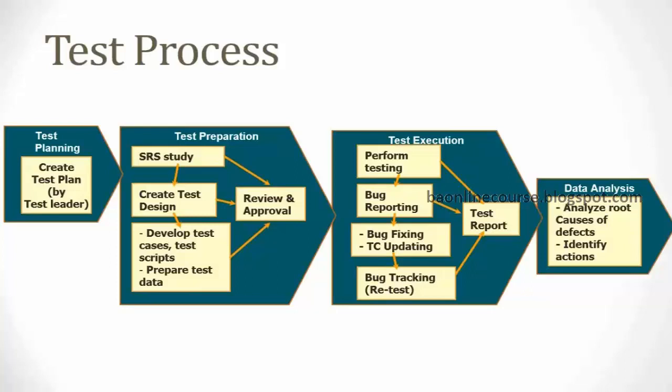First step, you will create a detailed plan, similar to what we did with our requirements. We prepared that work breakdown structure and then came up with a detailed plan, right? Similarly, a test plan is also prepared. It also has a lot of other details, which we sometimes call a test strategy. Like who is your testing team? Do they require any training needs? Which environment are you going to test? What is the acceptance criteria? A lot of details are captured. We'll go through that in detail, but that's the first step. You're creating a detailed test strategy document, which has a detailed test plan, like the work breakdown structure and all the details.